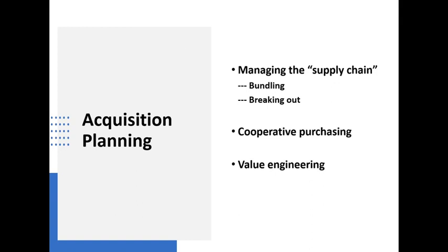The one caution that I would introduce here is that if you engage in cooperative purchasing, you must make sure that whoever takes the lead in the purchase is following the federal rules as well. Okay? And there have been some cases where these issues have come up, where somebody relied on a lead purchaser, and the lead purchaser didn't do all of the things that were needed competitively.